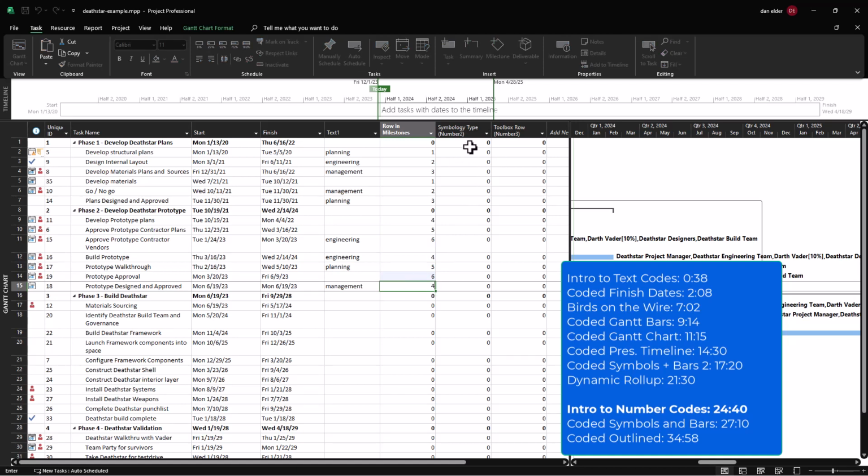The two that you need to really know about are probably milestone finish and then bar start and finish. So milestone finish is going to be symbology type 1. If I have any milestones that I want to put, like maybe these down here, I can set those to 1. And if I want to bring actual bars for these tasks, I'm going to set those to 5.